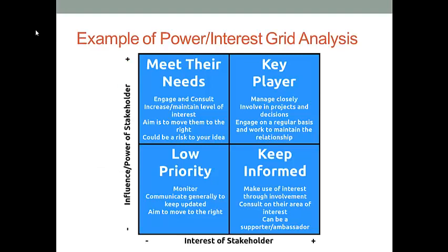If you want to identify different stakeholder groups, in practice, we usually use something called the power interest grid analysis to identify them. As you can see on this slide, we want to separate project stakeholder groups according to two criteria: their interests in our project and their influencing power on our project.